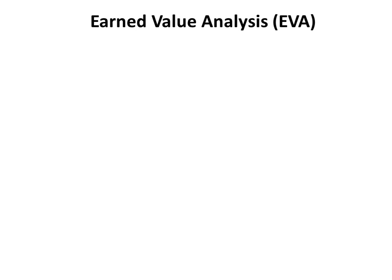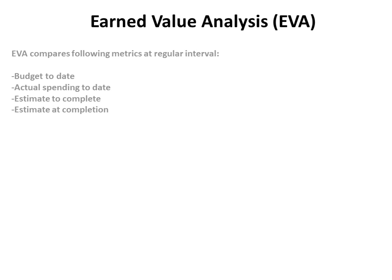Earned Value Analysis (EVA) compares the following metrics at regular intervals: budget to date, actual spending to date, estimate to complete, and estimated completion. In a CISA question, if any of these specific metrics are mentioned and the objective is to monitor the project, the answer should be Earned Value Analysis.